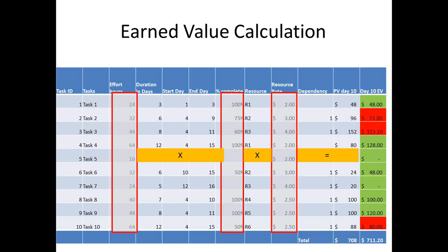As you go down the list, you can see that some activities are finishing earlier and some activities are not finishing as planned. So once you do the cumulative, as long as you're ahead of your planned value, then you're on schedule. If those activities are on the critical path, then that's a problem because you may not get finished on time.